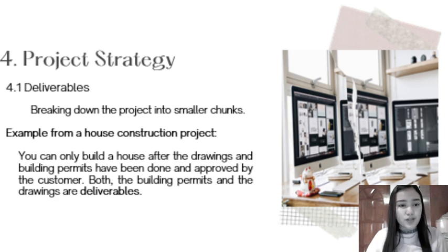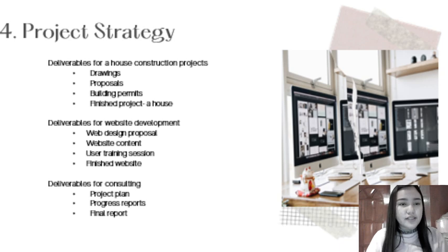Example, from a house construction project, you can only build the house after the drawings and building permits have been done and approved by the customer. Now, the deliverables of a house construction project are the building permits and the drawings. I have listed the deliverables for a house construction project, for a website development, or for a business consulting. So you could just pick from the deliverables below if you want.